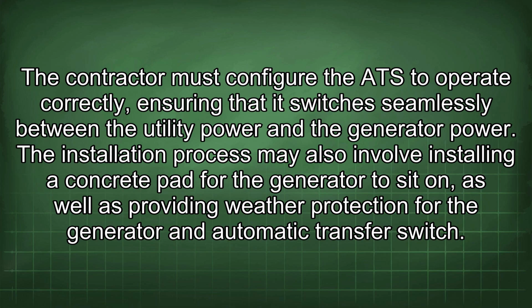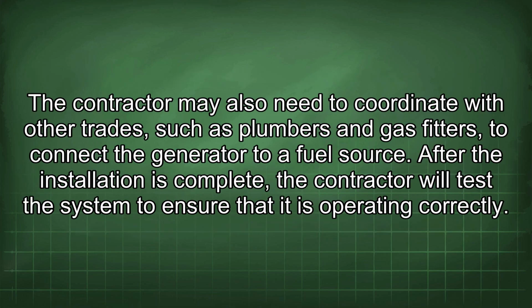The installation process may also involve installing a concrete pad for the generator to sit on, as well as providing weather protection for the generator and automatic transfer switch. The contractor may also need to coordinate with other trades, such as plumbers and gas fitters, to connect the generator to a fuel source.